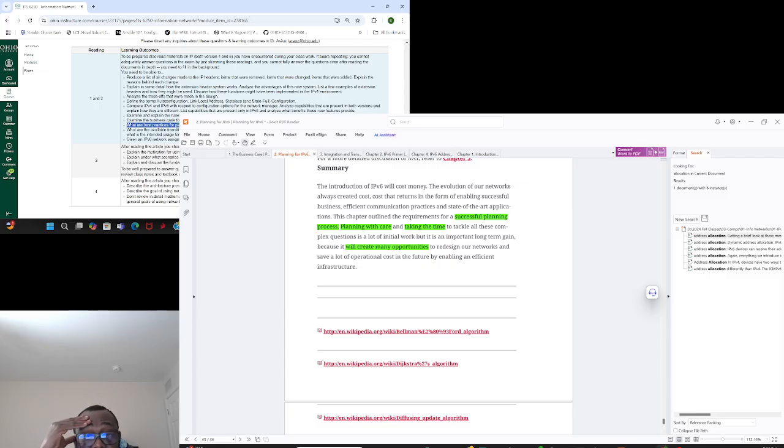So as supposed, start from the core to the edge. Starting from the edge to the core should be something that you should avoid. Your edge is your end nodes, your end connections to your clients. You call them customer facing devices. Those connections, you want those to be one of the last things you do because those places are not really matured, unless you are hit with time pressure where you have to quickly deploy a service for the customer. Then you can start from the edge to the core.